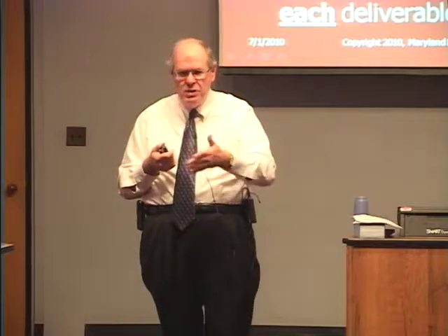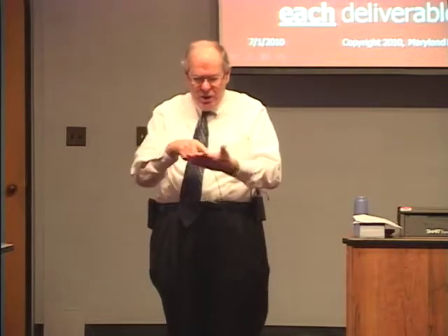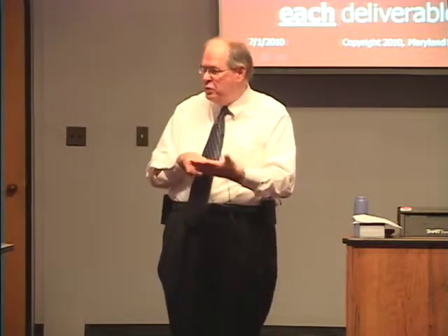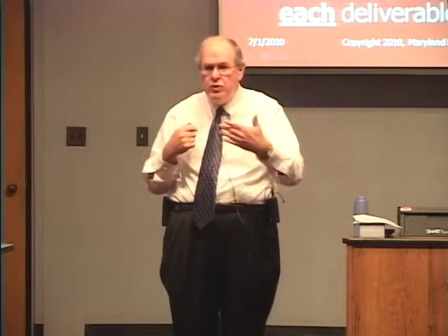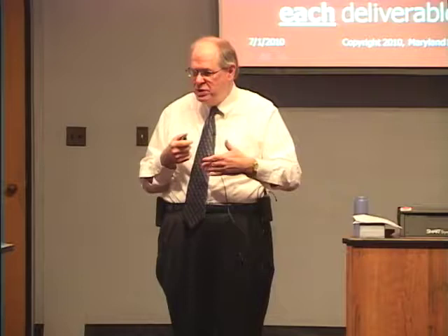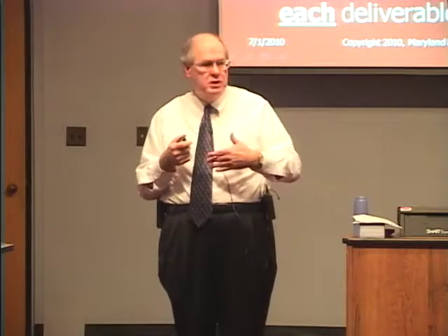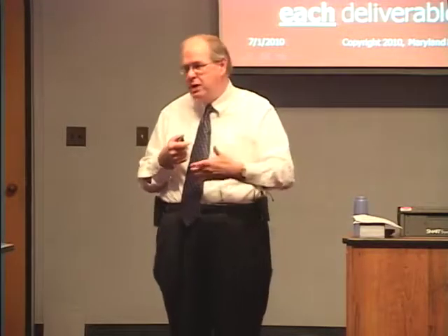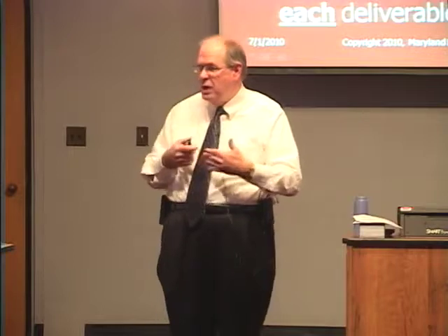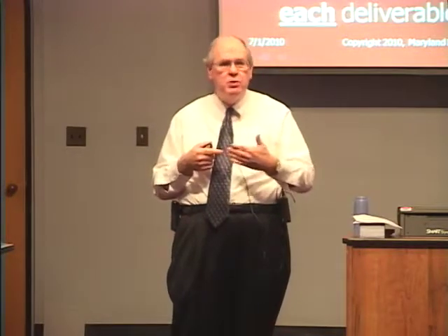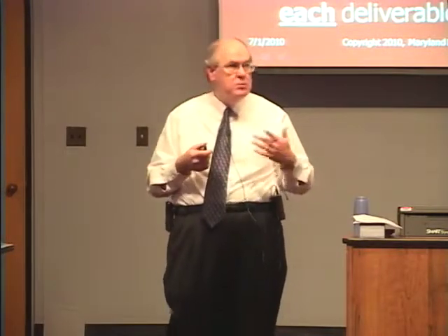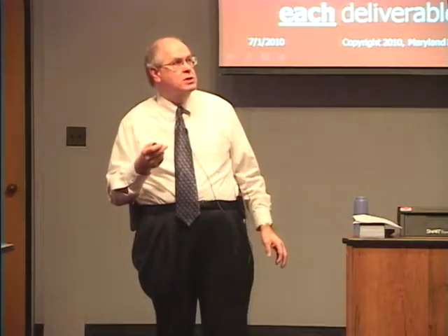If there's a document in the solicitation that says, here's what has to be done at various times, so that everyone who is potentially going to bid on this can see that this has been structured already, they're going to make the assumption that you're going to manage the contract. And that's half of the battle for the vendors to believe you're going to do it. So do the contract compliance checklist.